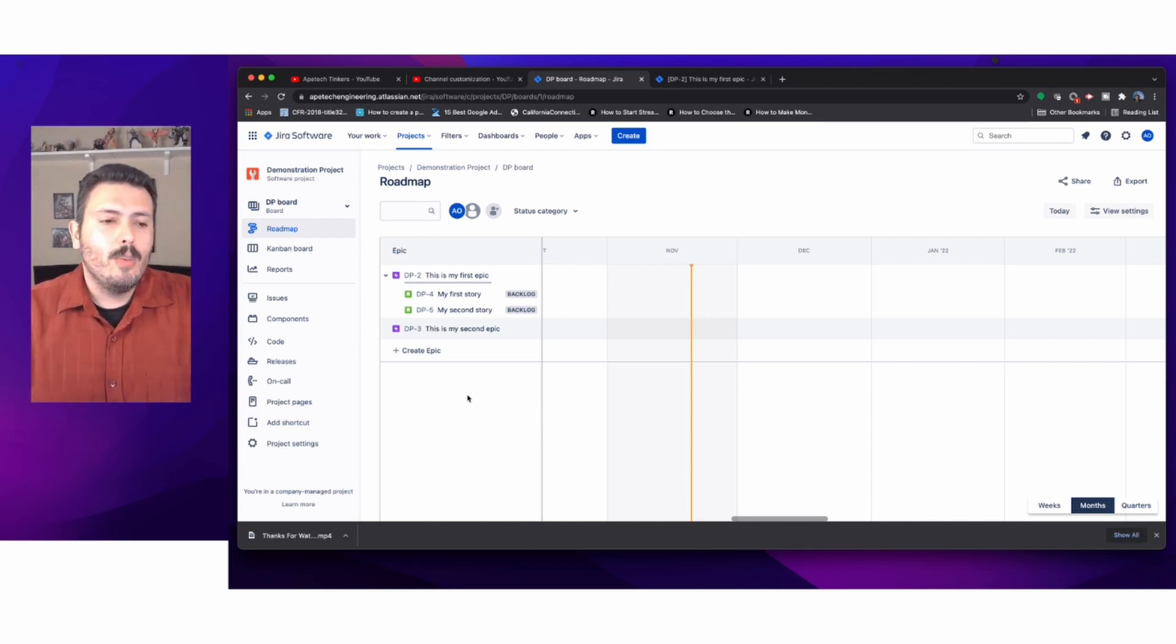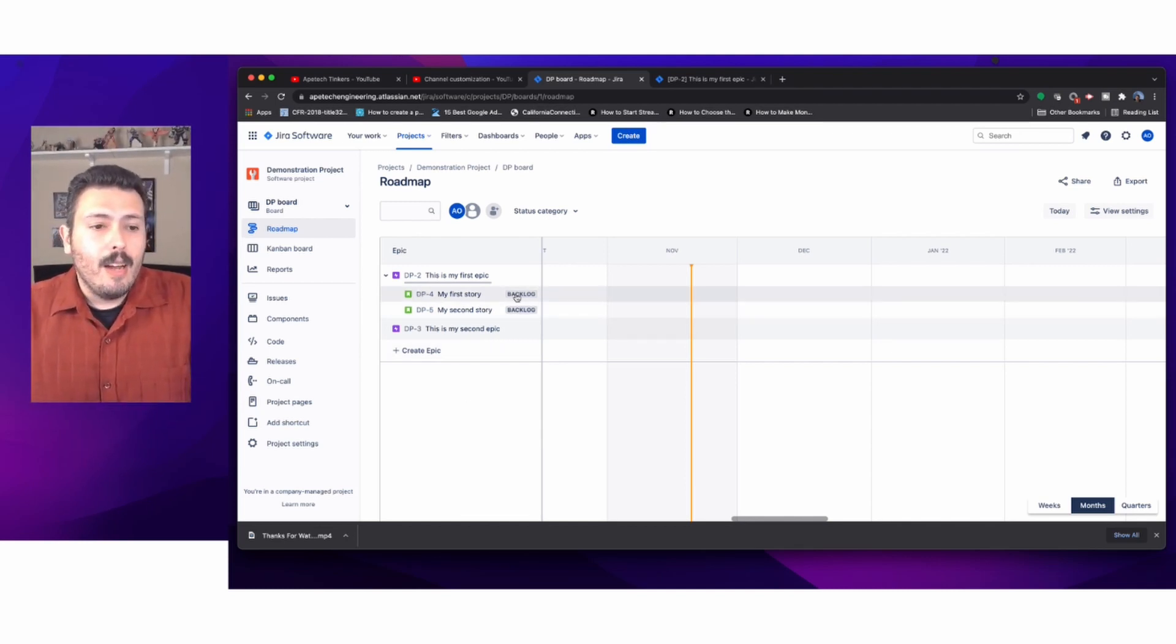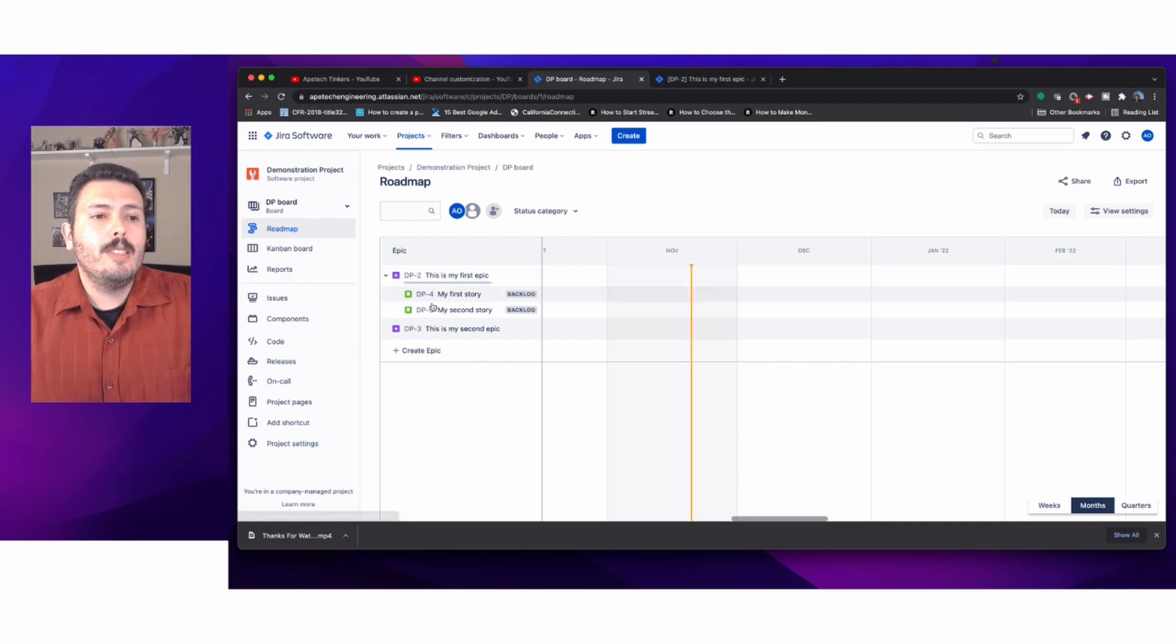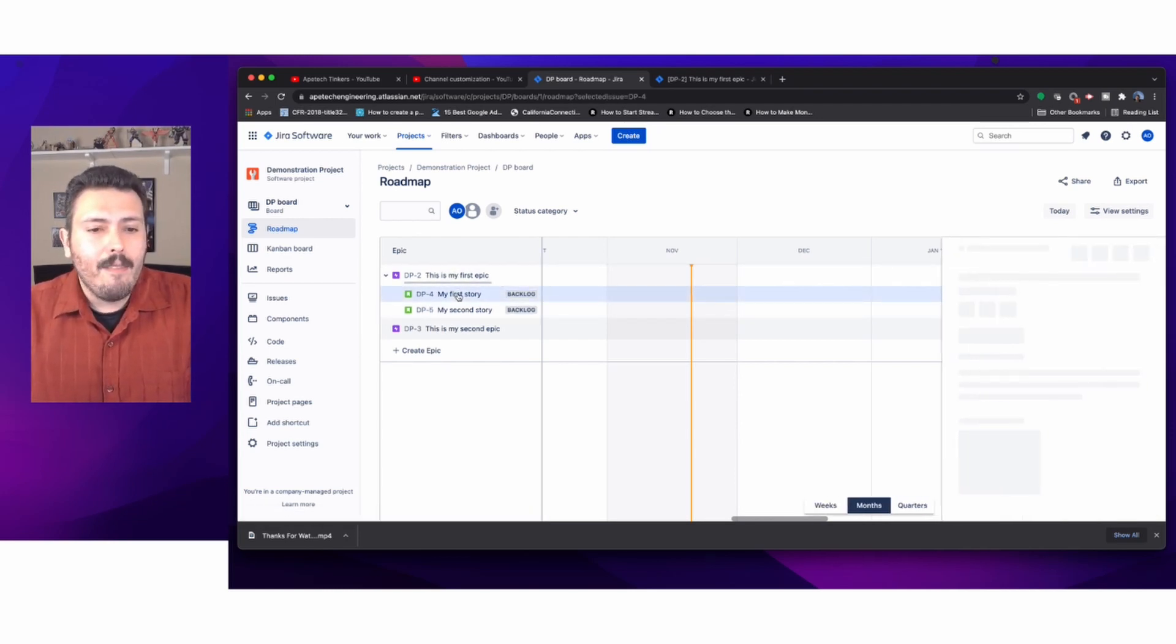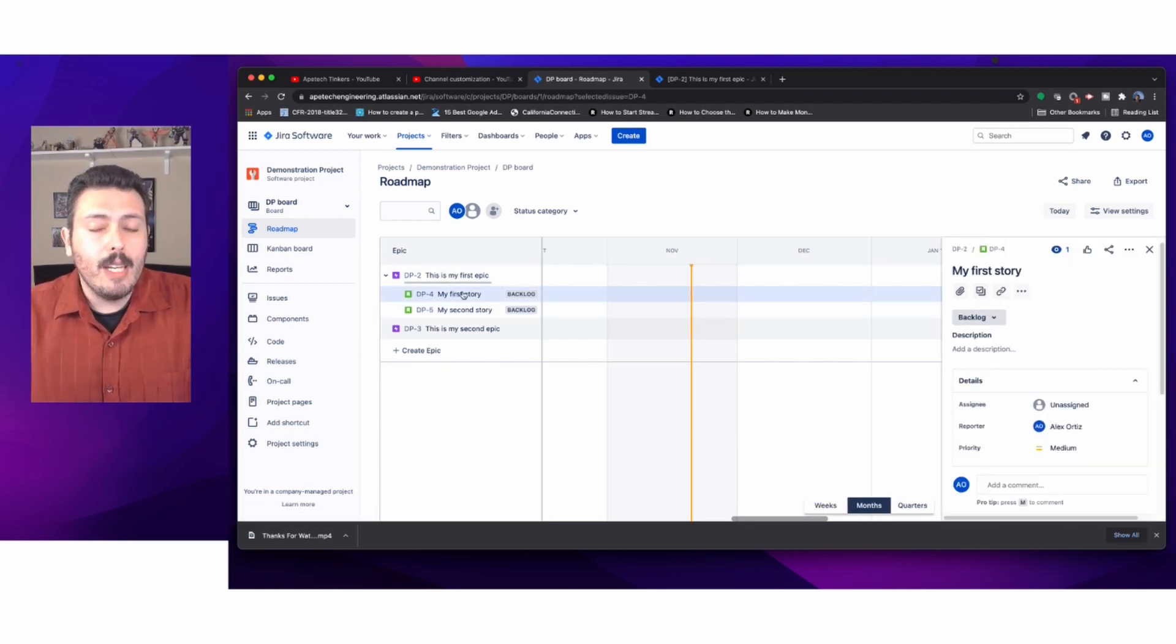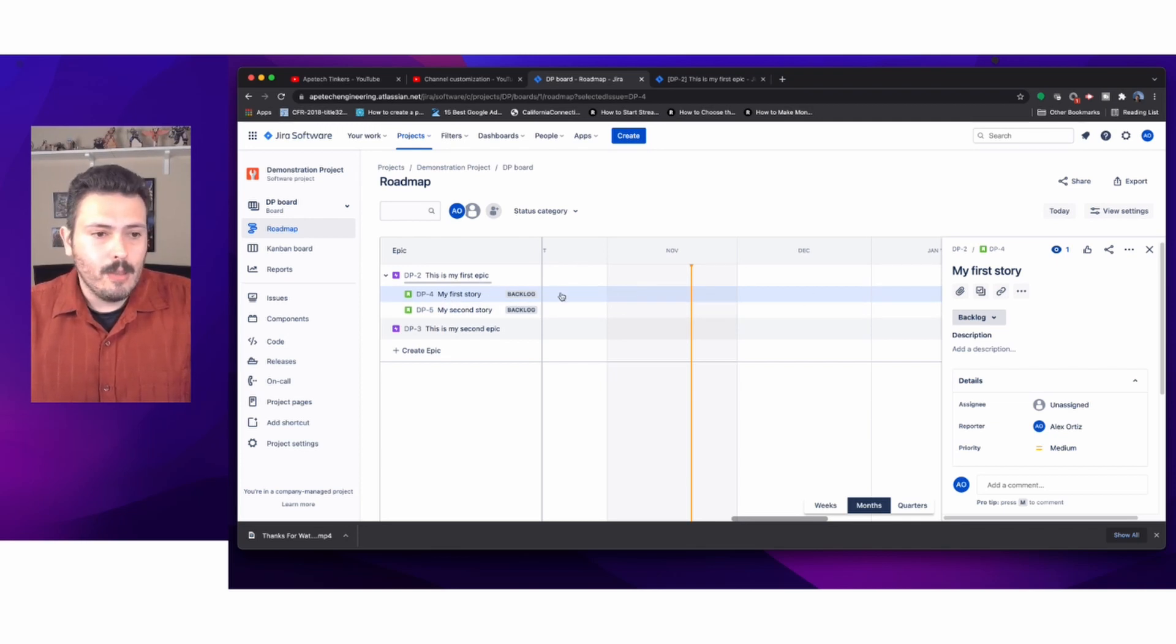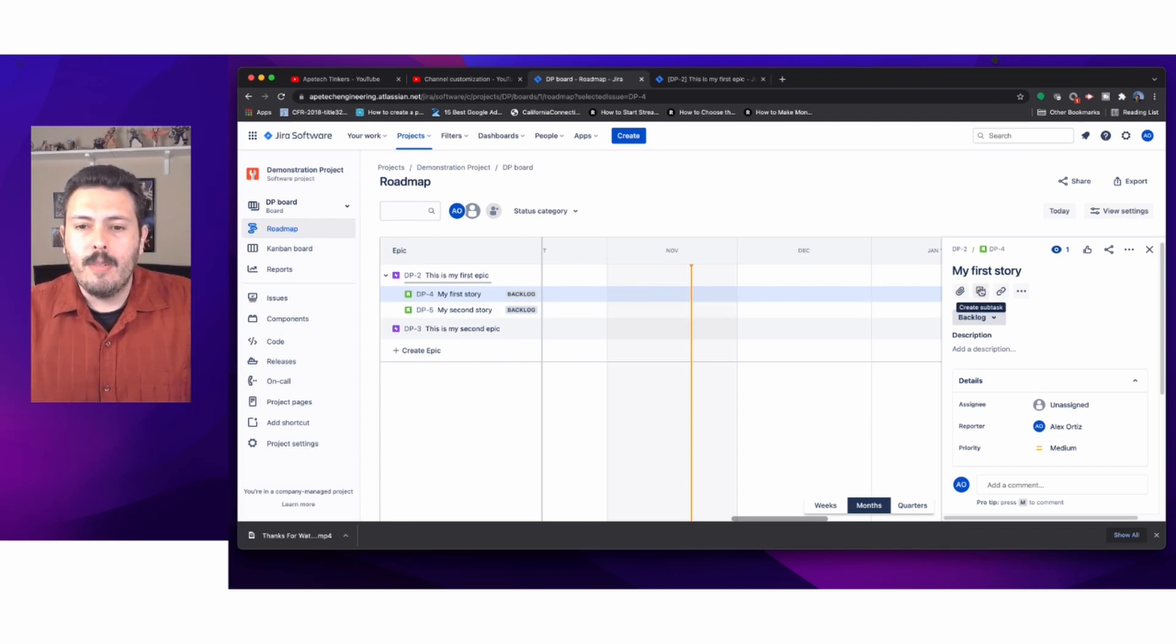Unfortunately in this view, the basic roadmap, I can't further decompose this. If I wanted to create a subtask, I would have to open the story, come over here, and click on create subtask. That's the only way to do it.